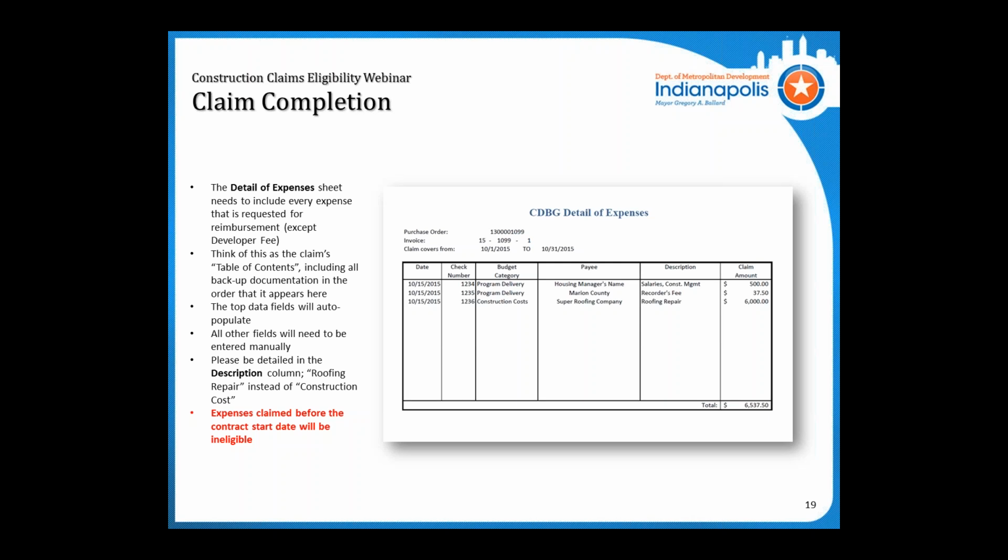So again, the top fields will auto-populate, and all other fields will need to be entered manually. Please be detailed in the description column. Don't enter something like construction costs or anything that big. Include something like roofing repairs so that if we have any questions on the invoice, we can match that up and make sure we have all that documentation.